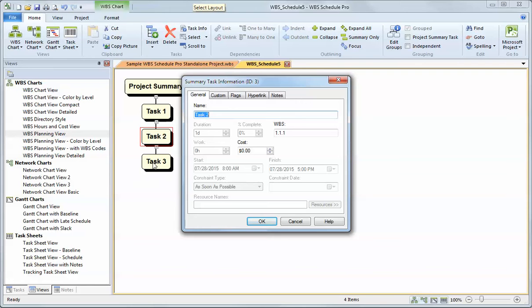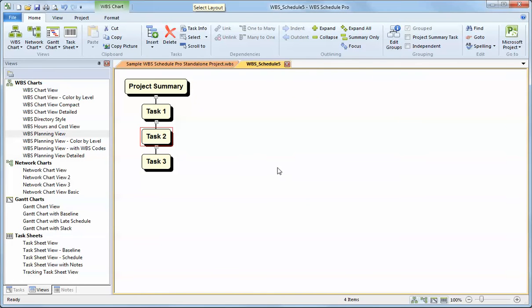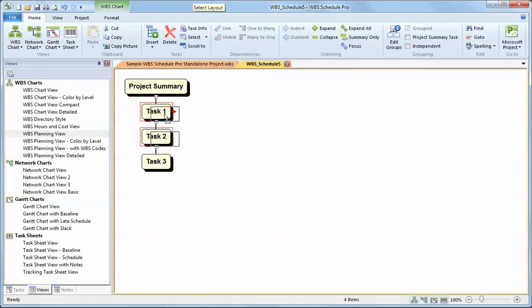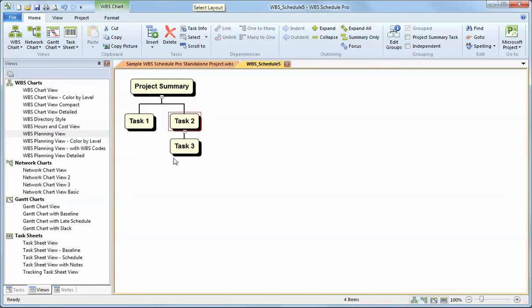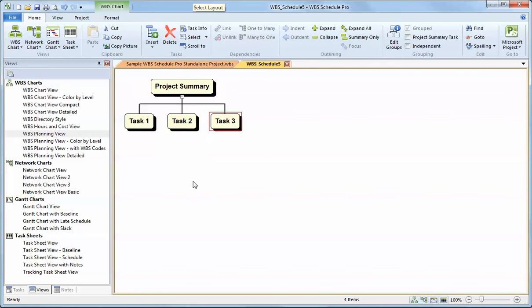If I double click on that, I can see that it is a summary task and it is rolling up information from the task below it. If you get into this situation, one thing you can do is use another feature, and that's how to rearrange tasks in the chart by clicking and dragging. If I'm on this particular task and I want to move it next to this task, task two next to task one, I simply click and drag. You can see that when I hover over the task I want to put it in relation to, it will show you a little red arrow to show you the direction that it will place that task when I let go.